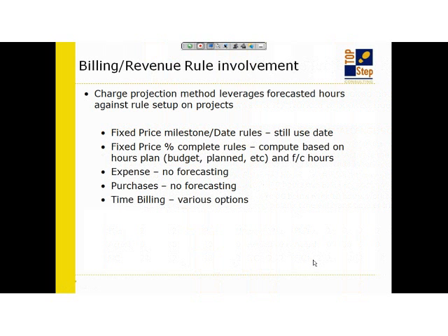The percent complete rules, I will tell you that about 99% of you that use percent complete rules for billing are actually doing it based on a milestone completion, which means the milestone hits 100% or this phase hits 100%. There are cases where I see people saying when it hits 25, bill a certain amount, 50, and so forth. But it's usually 100%. And what OpenAir will do is, 100% means the project is done, or the task is done, or the milestone is done.